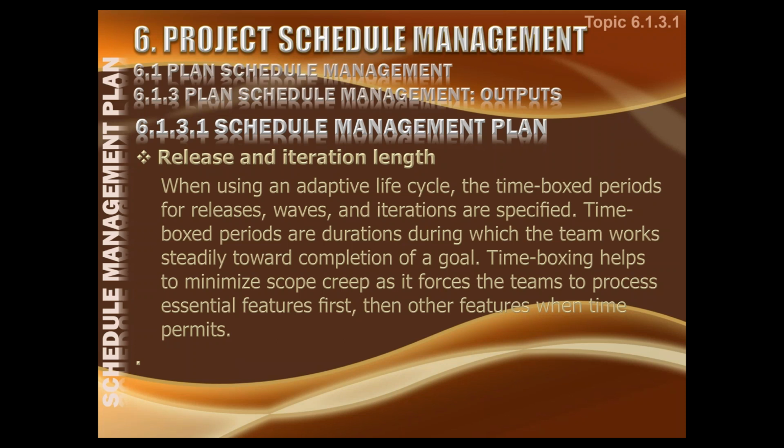I have been giving you an example of 4 weeks. It could be 4 weeks, it could be 2 weeks, it could be 6 weeks, depending upon the type of project you are doing. Maybe these, whatever we are saying, 2, 4, or 6 weeks, are more appropriate for software development. But maybe for construction, nobody has tried it. Maybe the time box for a construction project may be 3 months. So whatever you decide, this is tailoring you can do.